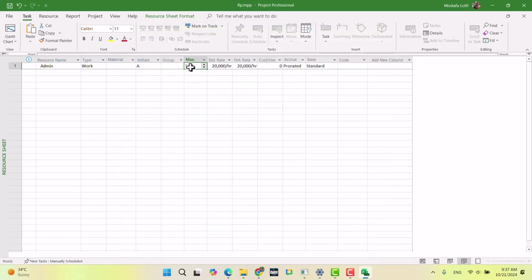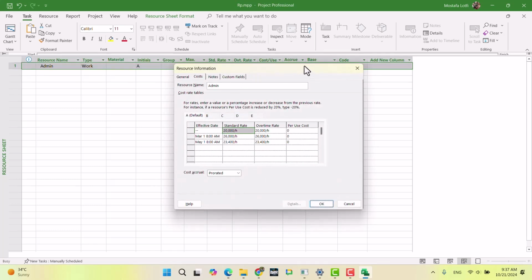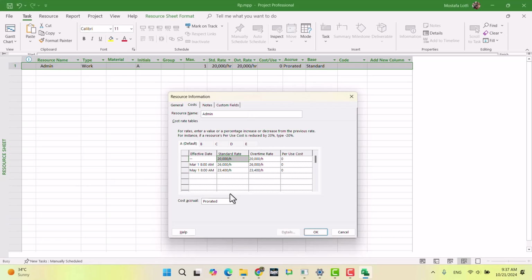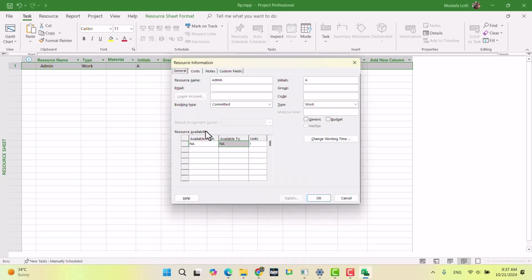Okay, so it is saying 4 available, but the availability of them depends on the time of the project. So I cannot just leave it as 1. I need to change it based on what it mentioned. So from NA to 1st of March, no, first 2 months, November and December. So till end of December I have 2, right?